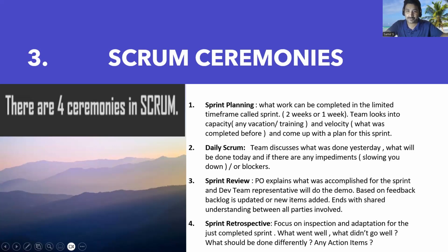and we have to capture some action items if possible. What are action items? Action items are corrective items. It can be anything. An action item need not always be additional work. An action item can also be removing work so that the team does productive work, right? For example, there are too many meetings. So when we have too many meetings, the action item will be to cut down on the meetings for the development team. But the result of the action item is more time for the development team to work on the software. So that is the retrospective.